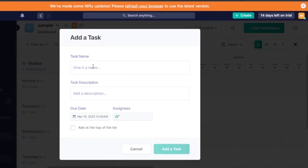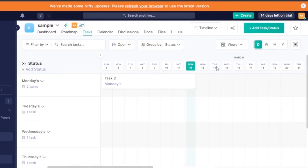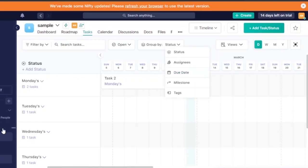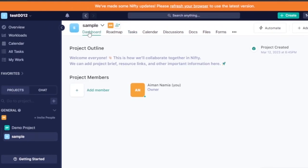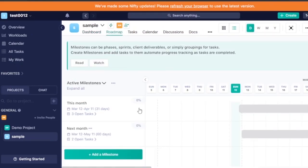Tasks can be grouped by status, assignees, due date, milestones, or tags. This is just a sample project with demo tasks. The dashboard also shows a roadmap view which represents all tasks for the current and next months — if all tasks assigned for a month are completed, it shows 100% completion for that month.